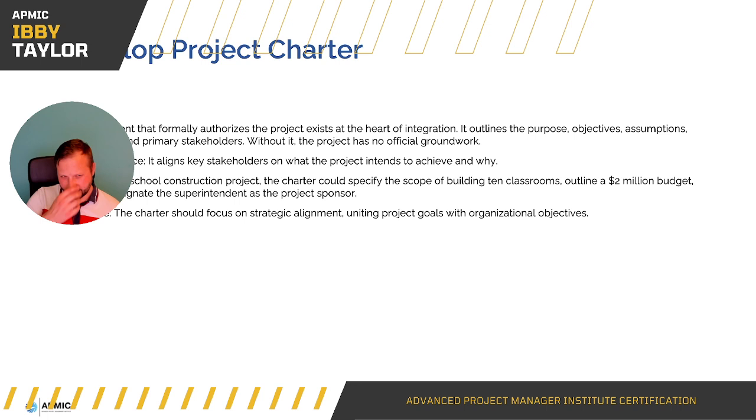So a few key points here. Develop project charter. The document that formally authorises the project exists at the heart of integration. It outlines the purpose, objectives, assumptions, constraints, and primary stakeholders. Without it, the project has no official groundwork. This is like the foundation of your project, and everyone knows in order to build something strong, you need to have solid foundations. So the significance: it aligns key stakeholders on what the project intends to achieve and why.